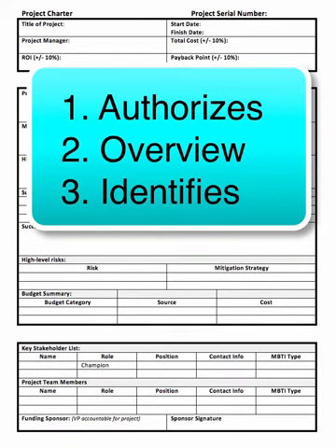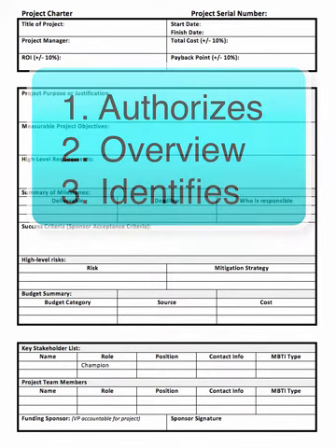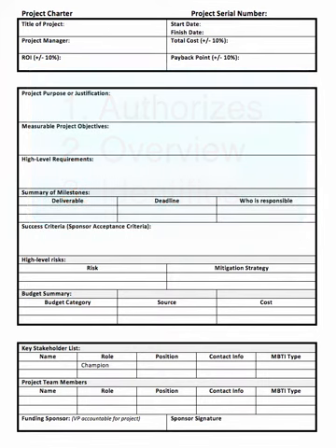And the main reason that you have this is to initiate the project and to identify the high-level overview and the stakeholders. But there's one little hidden meaning here too, and that is it keeps the project from having what is called scope creep. Now, that's not a person. That's the way a project takes on a little bit more than what it was initially designed to do.